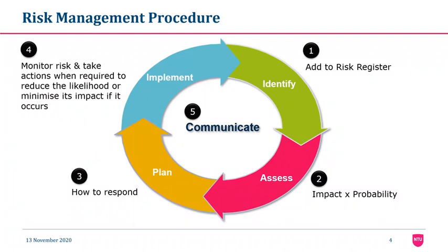The first step is to identify our risks in the projects, both threats and opportunities that could affect the project outcomes. And then we should create a risk register that encompasses all risks we identified. And this helps us to manage risk during the course of the project. In the next step, we assess the risks in terms of their probability and impacts on the project objectives.